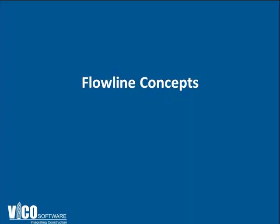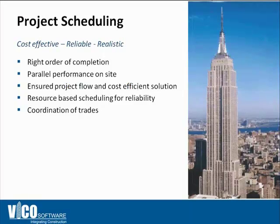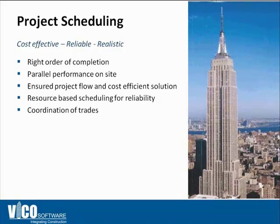Flowline is actually not something new. It was used in building the Empire State Building, which was built in just a little over one year. The builders had to manage thousands of people on a very tight site. They basically drew Flowline on paper with pencil, which helped them ensure continuous flow and efficiently utilize the tight site during construction.